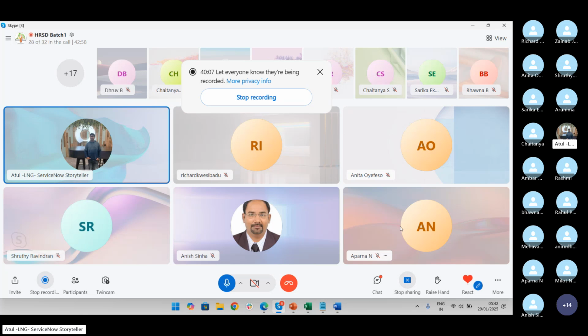Not only recorded, after the workshop has been done, as a BA or BPC, we should send a summary mail as well: what we discussed, what the open action items are, what has been approved, what is pending, what needs to come back from the customer, what needs to come back from you as a service provider. Just saying yes, I conduct workshops, will not work.